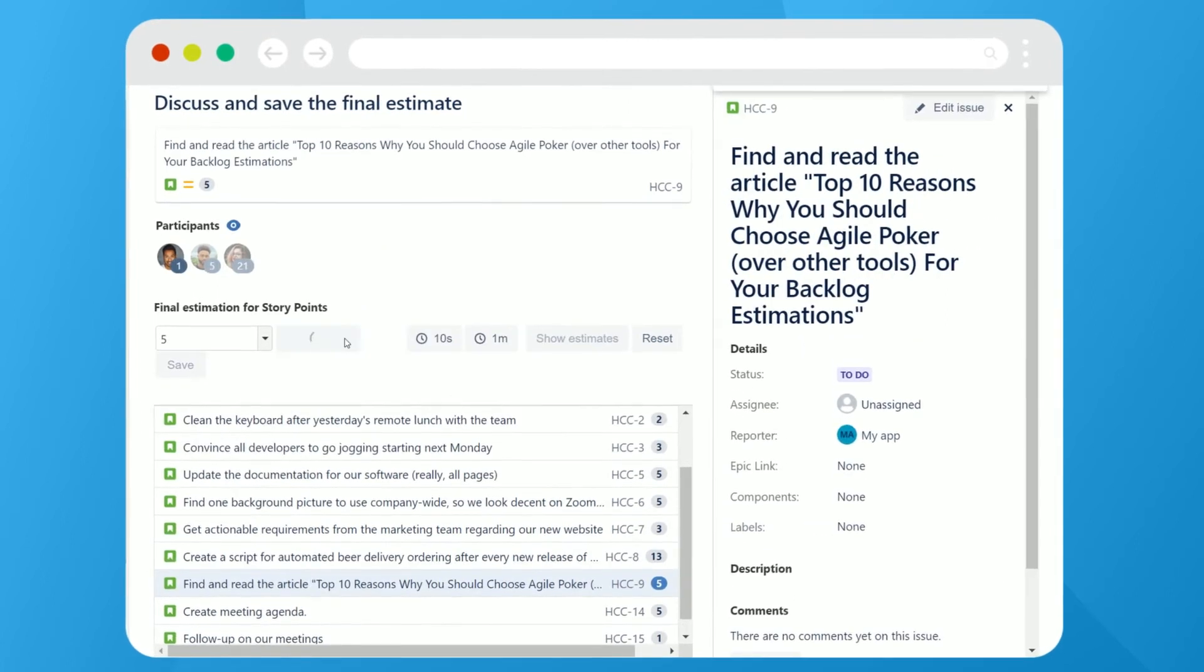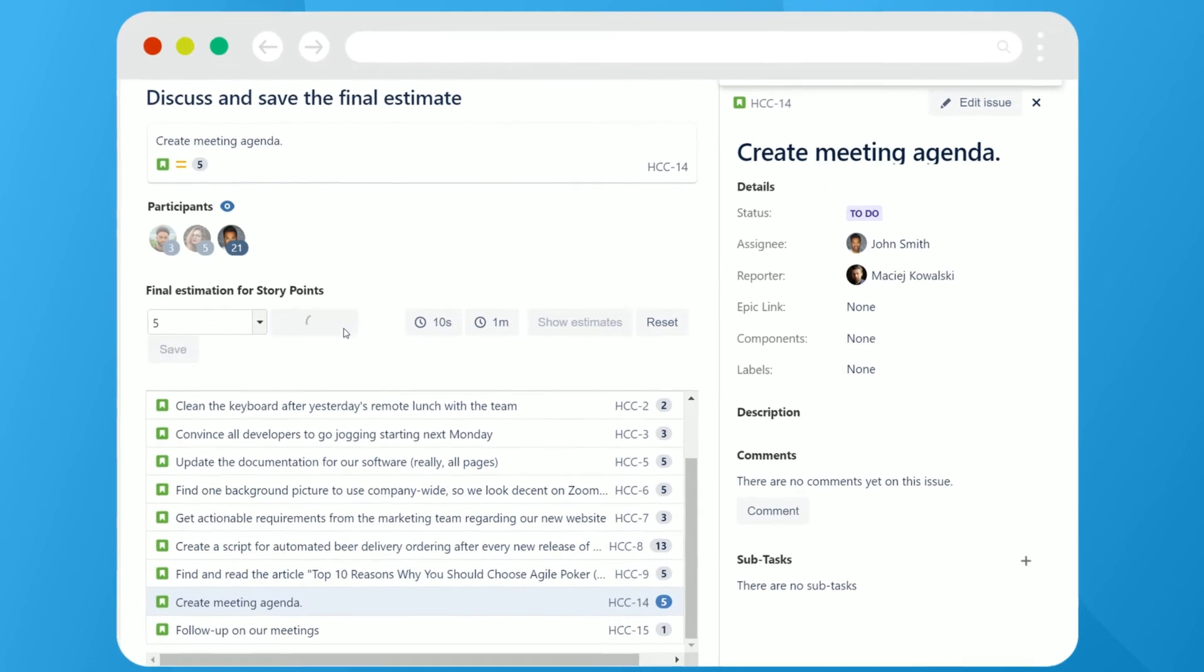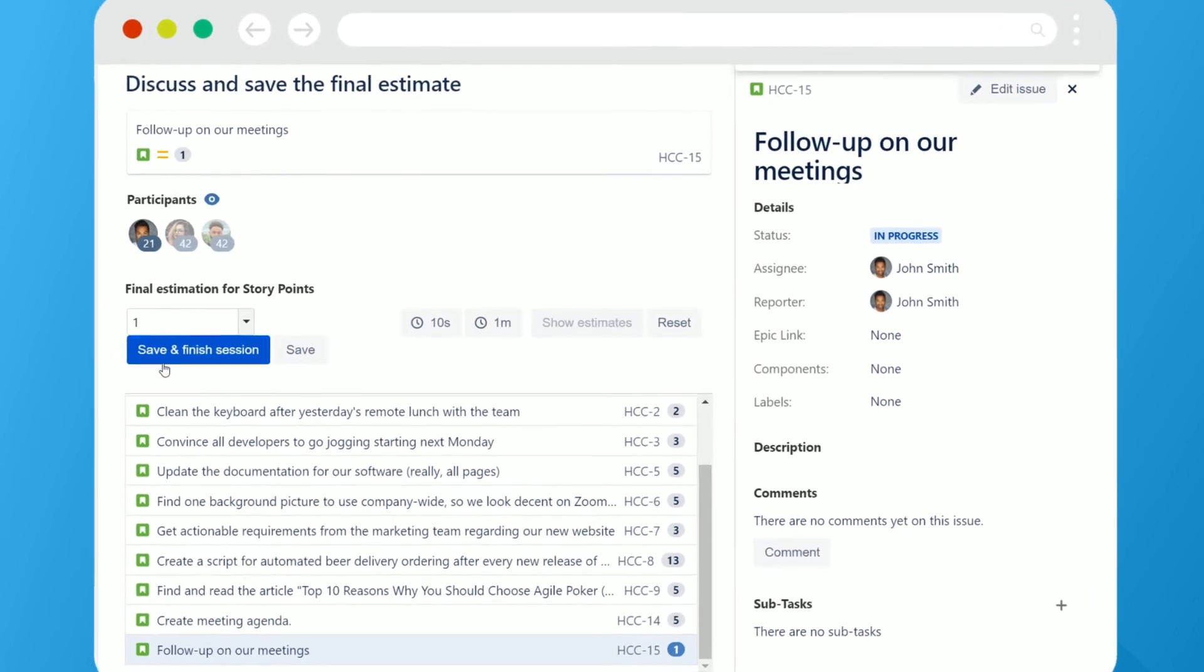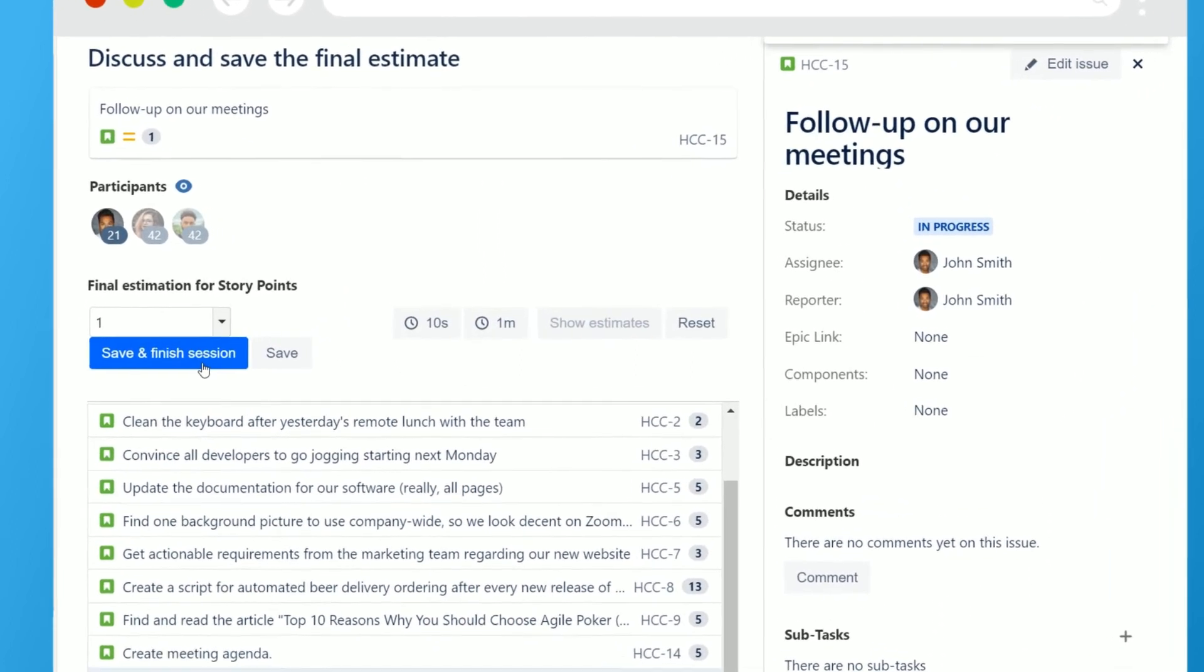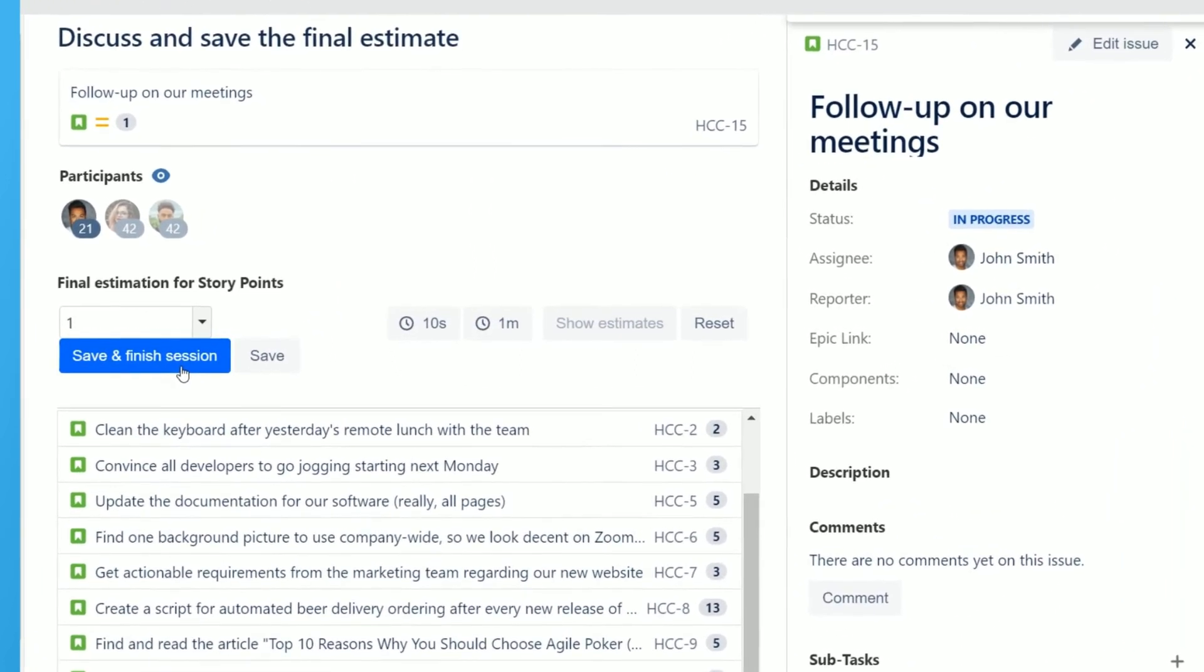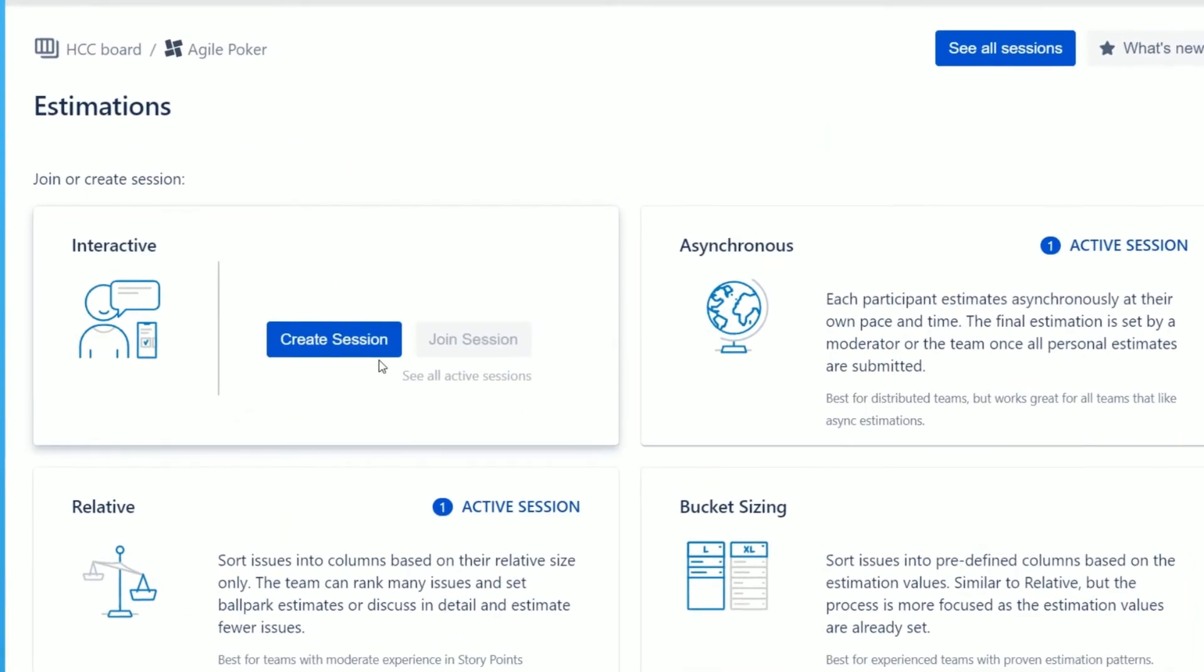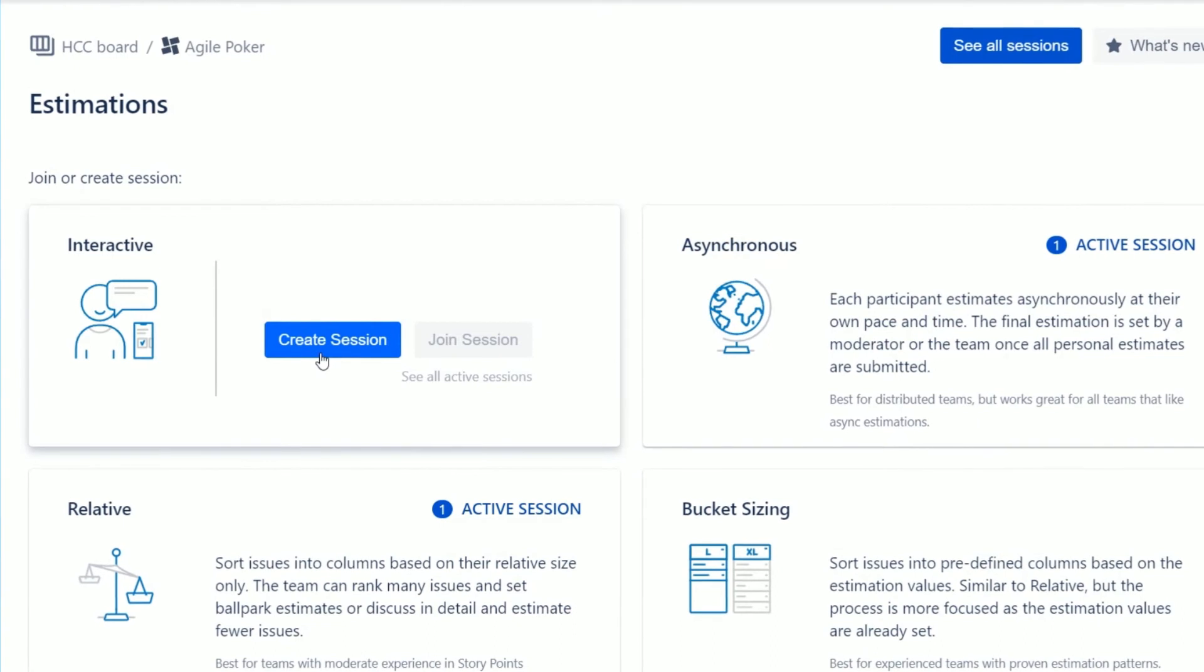When all participants submit their estimates, the session moderator can review and save votes or proceed with a planning poker session to reach a consensus and get the final estimates.